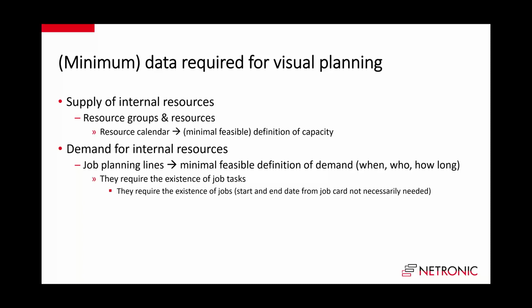So your customers, or you, if you're an end customer, you need to set up resource groups and resources. And also we would need the resource calendar, right? So if you have a resource, give it a calendar. Say this resource works, for example, from Monday to Friday, 8 hours a day. And this is, let's say, the minimal feasible definition of capacity.